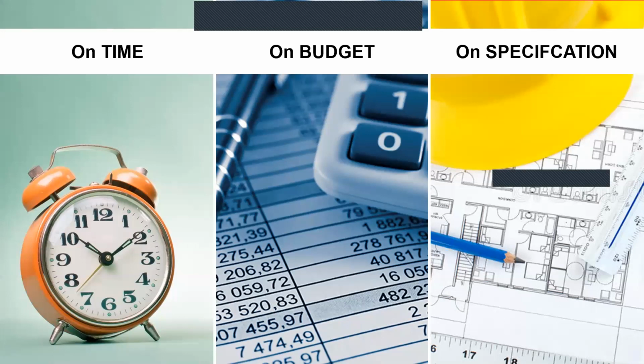Even the company who gave the contract will not pay you more, because there are liabilities and there are LDs for this, so if you don't build to specifications, you have to pay the price for that, and it will reduce your margins. So to make it as per specifications, they implemented 3D technologies there.